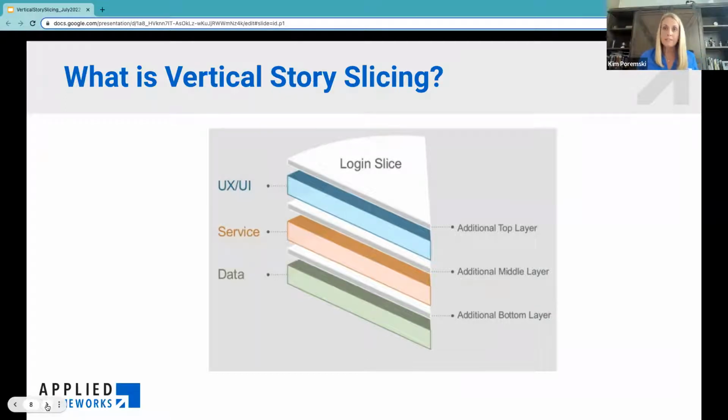So typically what happens is these user stories are representative of the horizontal tasks that everybody on the team is doing. But it isn't until you put all of that together, kind of flip it on its side, that you say, well, this is the value. Your UI piece, your middleware piece, your data piece, all together, that's the value, not the individual slices. So we're asking folks to kind of flip things on its side and think about it in a much more vertical way, not a horizontal way.